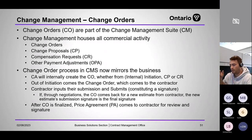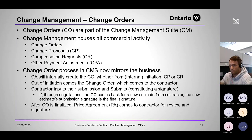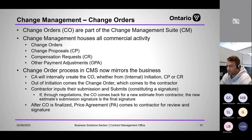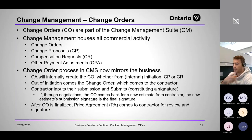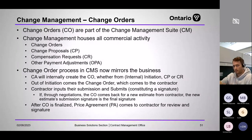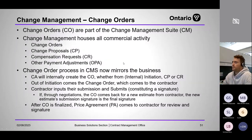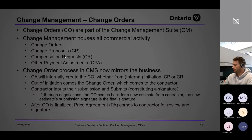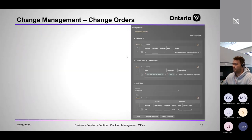When issued, the contractor receives one change order form that looks exactly like the old change order form — the PHCC form. They fill out their estimate, submit it back — equivalent to signing and returning it. That's for an extra work change order. Then the price agreement comes out: if the estimate is higher than the CA's and they agree, the CA internally gets more DOFMA and issues back the price agreement with the revised amount. The contractor reviews, signs the price agreement, and that's it. Happy path: receive change order, fill in estimate, sign and return; receive price agreement, review, sign and return.